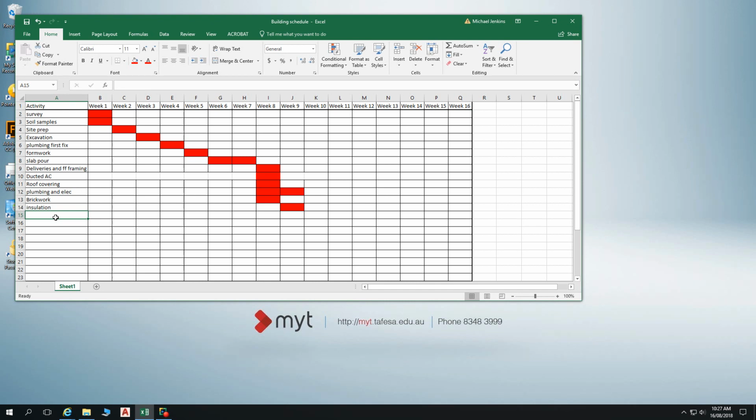Normally the average build is about 26 weeks. I think most of the spectator builds were 26 weeks to build, for contingencies. But realistically, probably about 20 weeks is the norm. That's what I'll go with.